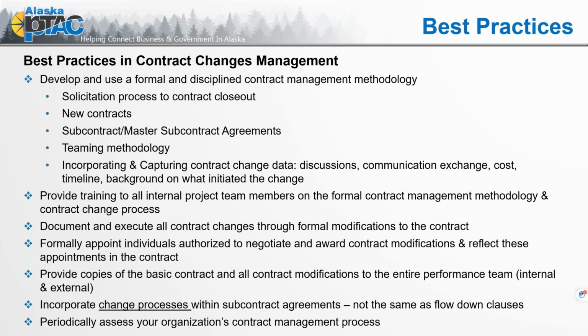I've worked with a lot of clients that were directed to do something that changed, that was truly out of scope work, but they didn't get the written confirmation. Suddenly they're coming back a year or 2 years later saying, we did all this extra work and didn't bill them, and now we want to get our final invoice and be paid for that additional work. But they're lacking the items I mentioned. They don't have any proof of discussion. The individuals that told them to do the work have retired or left the agency, and it's a little bit too little too late after the fact.